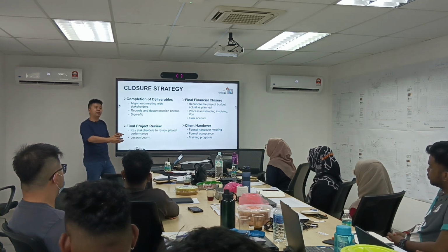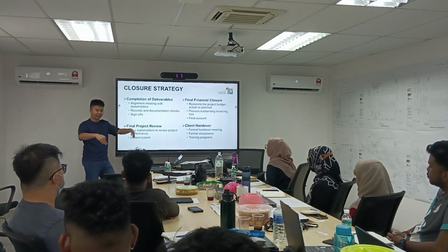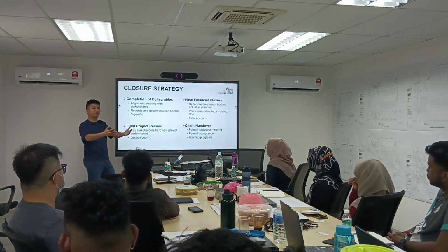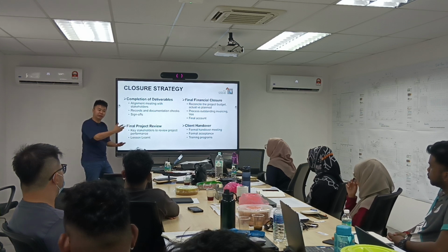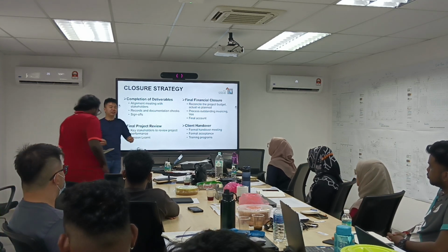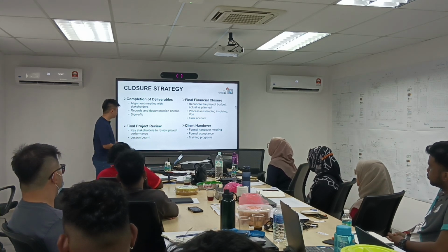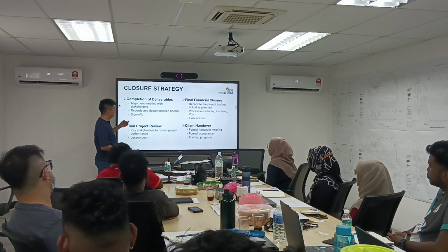So when the time comes, we really complete the projects. We ask them to sign off, and we give all the documents to them. I think being fair to both parties, they cannot come back and tell us that they need more of this and this, because we already clearly defined. So if we do that, it will make our life so much better. Okay?